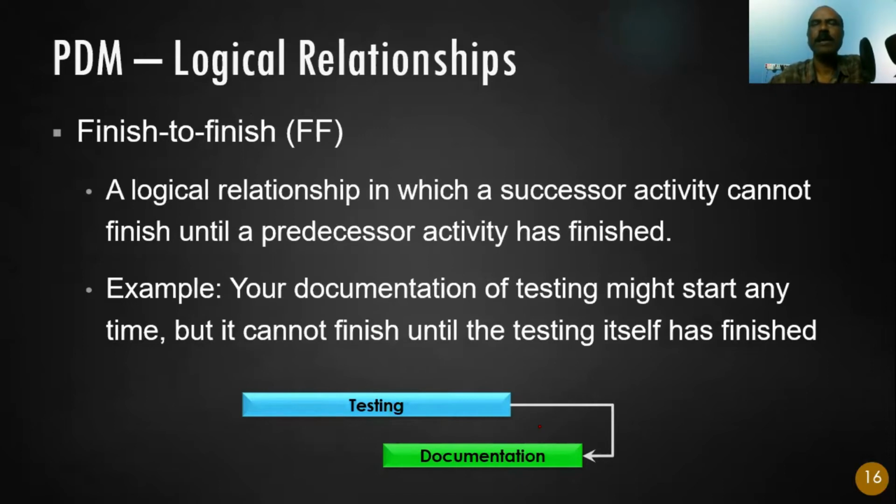Let us take, for example, in construction, let's say this is construction work, and then you need to provide as-built drawings. Normally, you don't wait for construction to finish to prepare the as-built drawings. As the work completes, you might be preparing some as-built drawings earlier also. But most of the work finalizing might happen after the construction work is done.